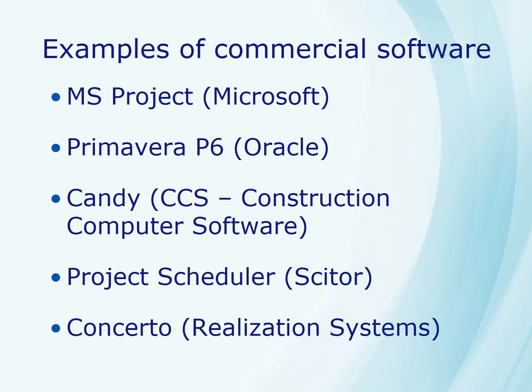MSProject is the most popular system, and I'll say something more about that later on. Planners on major projects often use the upmarket Primavera system. Candy is a South African developed system aimed at the construction industry. It's very useful for repetitive projects such as building of multiple stories of a high-rise building.